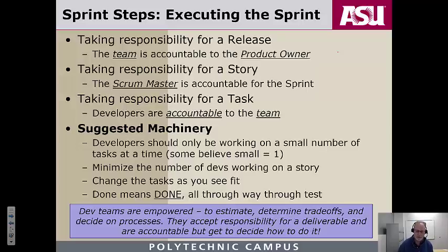It's a general practice in industry and Agile to try and keep the number of tasks developers are working on at any given time as small as possible, really one, meaning when I look at the work that's laid out on our Scrum board, which we'll get to, my name should only appear on one thing that's in progress, and I should work on that till completion.